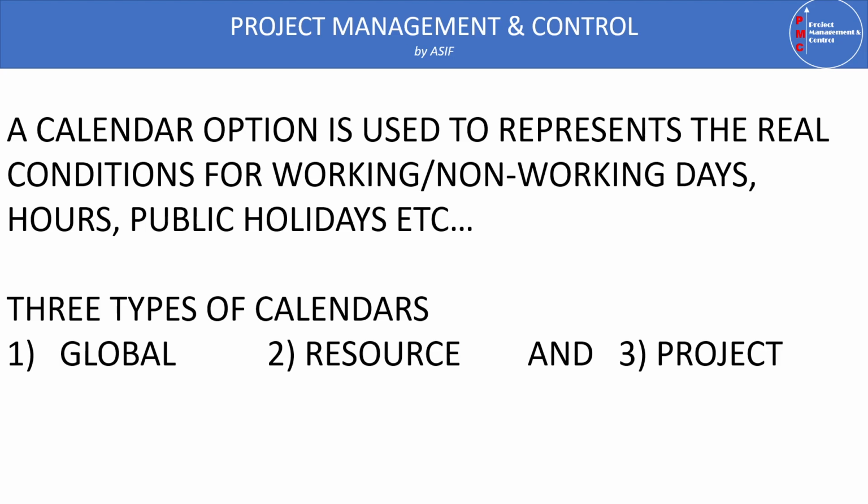In this case, you cannot start the project at 8 o'clock, because when we start at 8 o'clock, the laborers start working and some sound is created which the neighbors don't want. So the municipality of that area restricts us and tells us to start our activities at the site at 11 o'clock. If we start at 11 o'clock, then we have to make our timing up to 8 o'clock in the evening, and such a condition you can define in Primavera very easily.